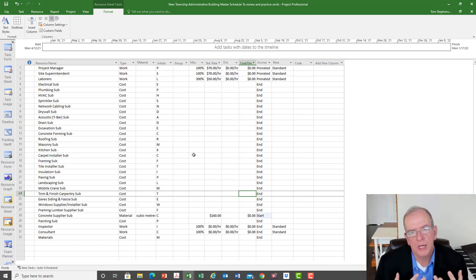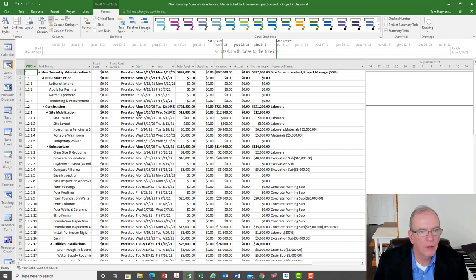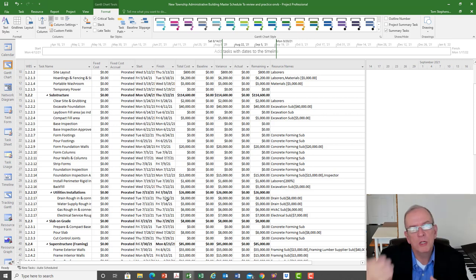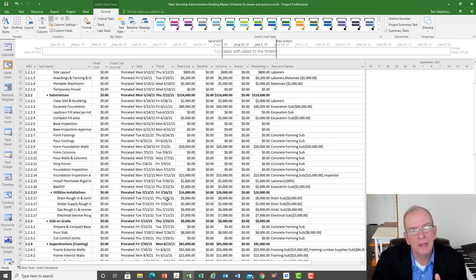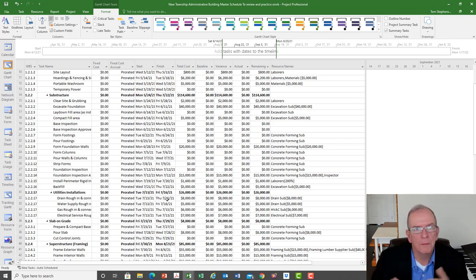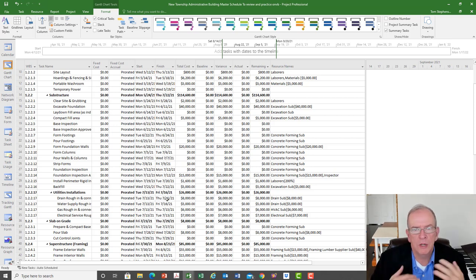Think about cash flow on a project — as things happen, how is money being spent? You may have periods with little money going out and periods with a lot going out. The next question is: if that much money is going out, how much is coming in? This tells me, along with my schedule of values to the client, what I'll be billing at those moments in time, trying to match outflows with inflows. The client holds back ten percent, but you have profit and overhead embedded in your price, giving some flexibility.